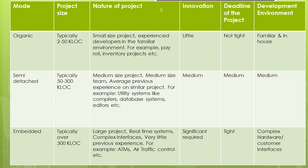In semi-detached mode, a development project can be considered of semi-detached type if the development consists of a mixture of experienced and inexperienced staff. Team members may have limited experience on related systems but may be unfamiliar with some aspects of the system being developed. In embedded mode, a development project is considered to be of embedded type if the software being developed is strongly coupled to complex hardware.